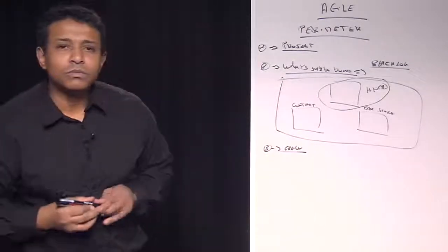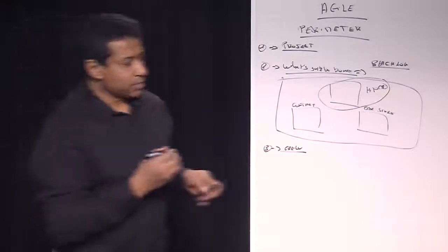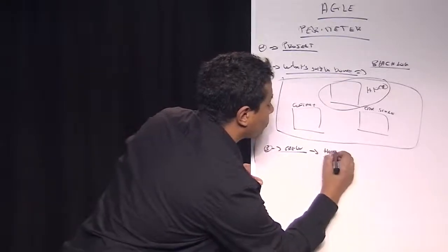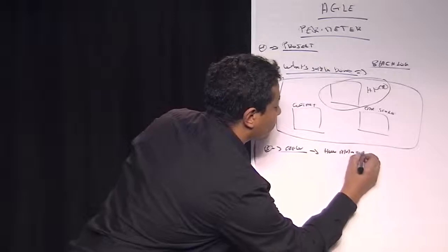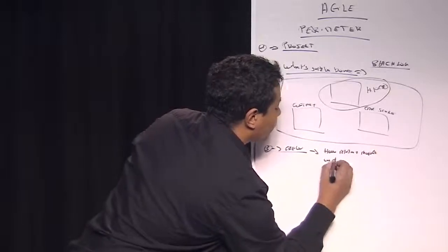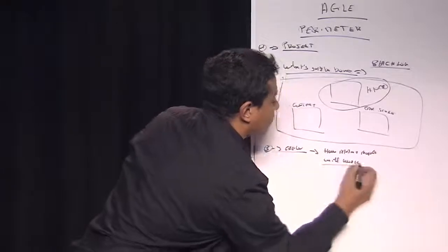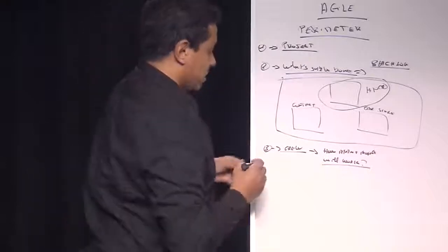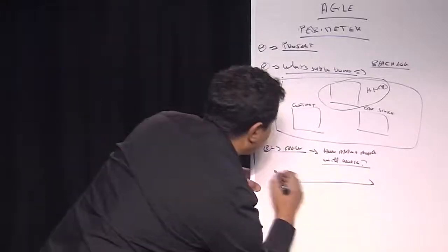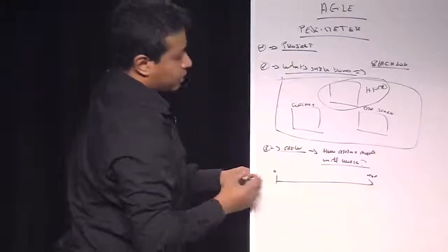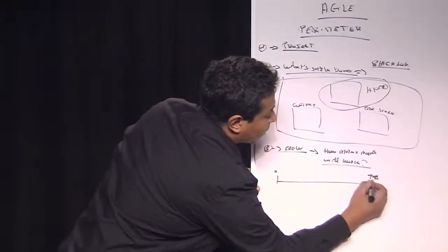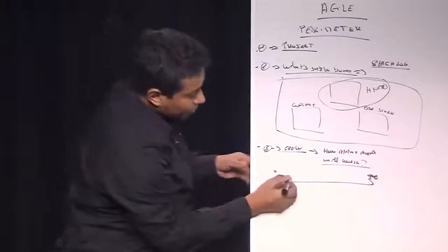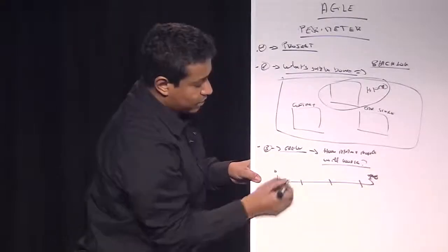of the crew. What does it mean? It means that I got to define how many people will work. Why do I need this? Because if I want to get a correct timeline to deliver my project at, let's say, again, 10, if I don't have this, I won't be able to say these steps.